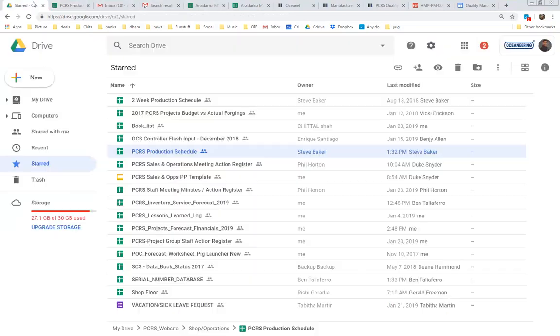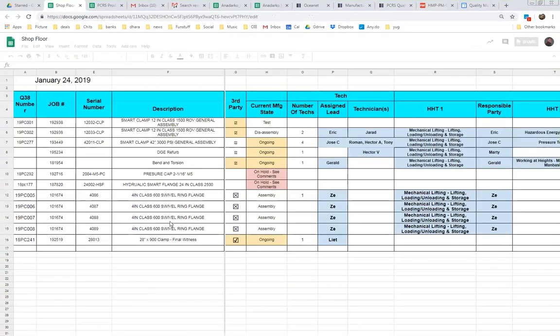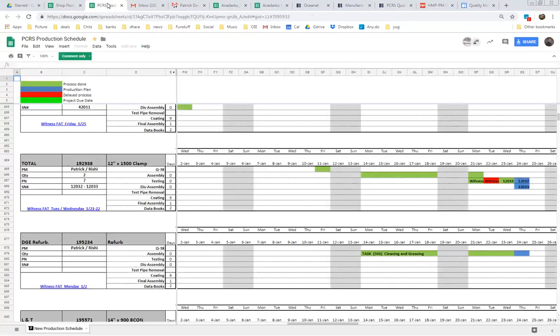And there is micro level production planning going on with the shop floor, so they put up every day what they're working on. From those items, they pick the items they're working on every day and manage who's assigned to it. All this is fed from PM schedules and the CRR, based on when the parts are coming. PM says, I need to build this in mid-February.